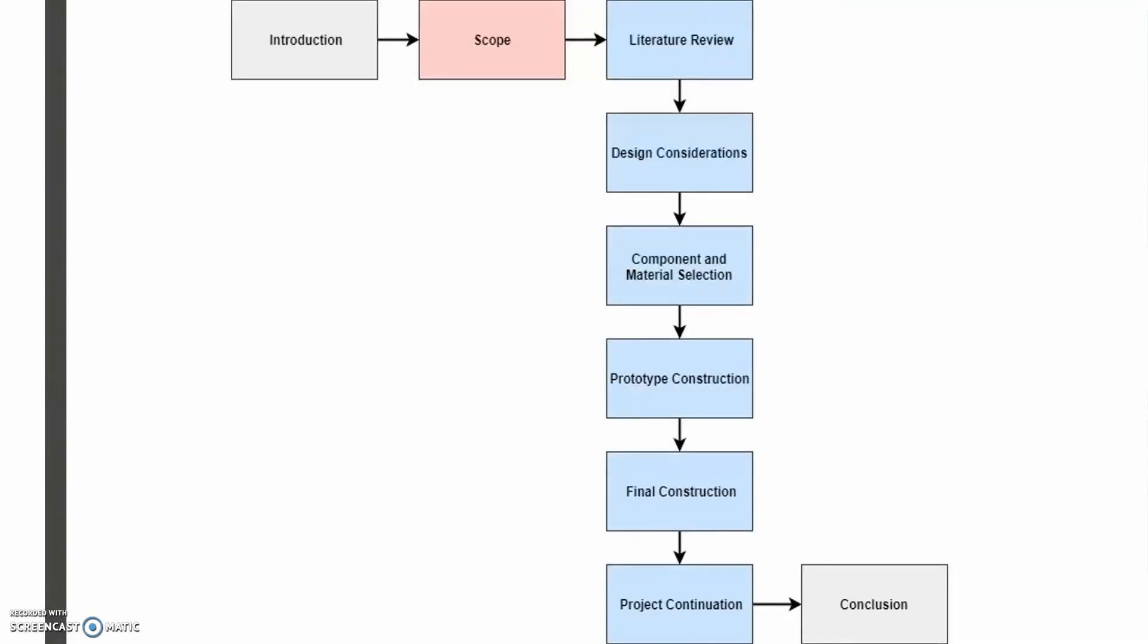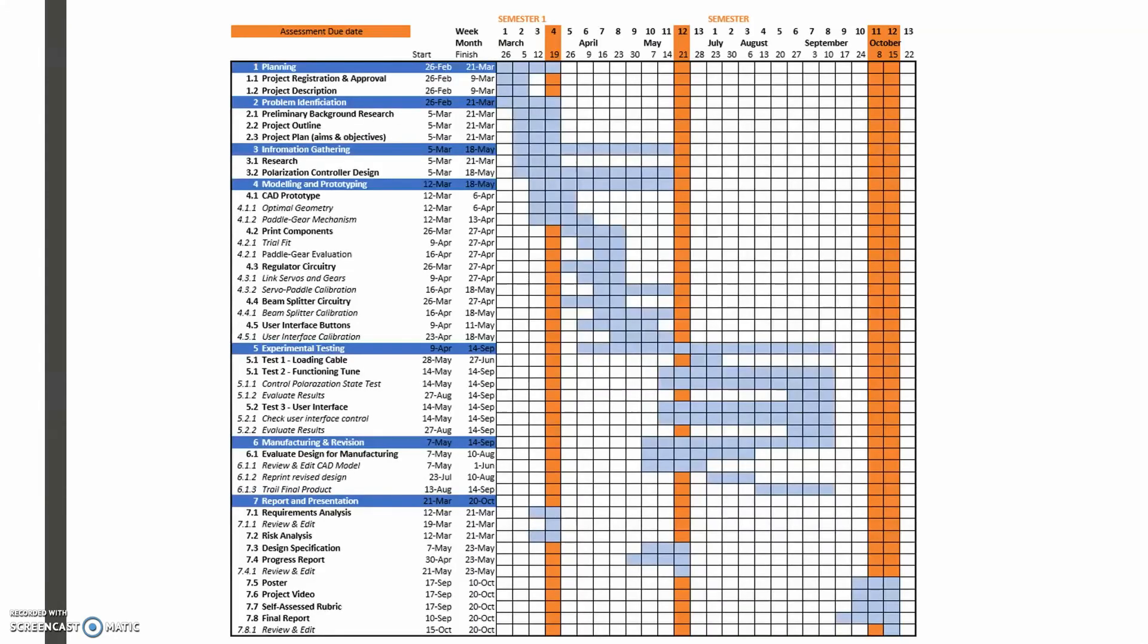To complete the project on time, I initially created a flow chart, which considered the design phases for the year. This was then made into a Gantt chart, which considered all the tasks required to complete the project on time. Each light blue square represents one week of the semester allocated to a specific task. These tasks have a start and finishing time and are the building blocks for completing each objective in the project.